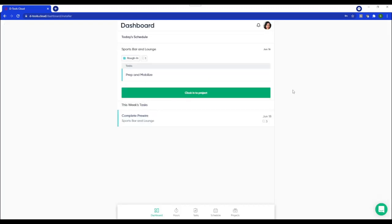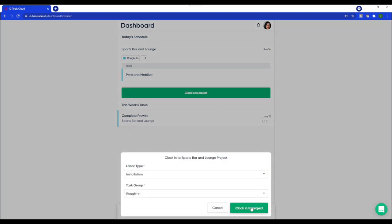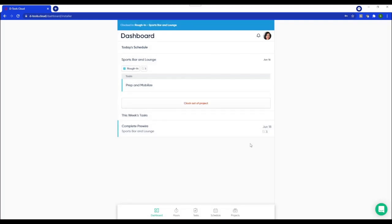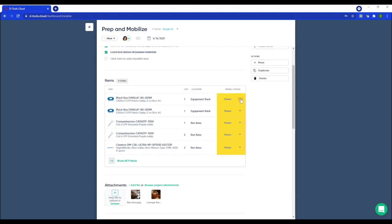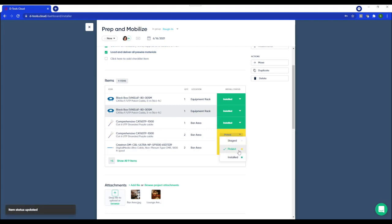So now we're looking at the field user view and it's formatted for their phone or tablet. And they can only access information for projects that they're assigned to. The menu at the bottom shows the dashboard, hours, tasks, schedule, and projects. So from the dashboard, I can see what's scheduled for today. And I'm ready to clock in to the project and start my task. And simply select the task to view all the detail that we added when we were creating it. We can look at the description. I could see my checklist items. Let's complete those as well as update item status from the field. So this is what's going to affect your project reports is when the status of the items change from the field, it's reflected back into the application.